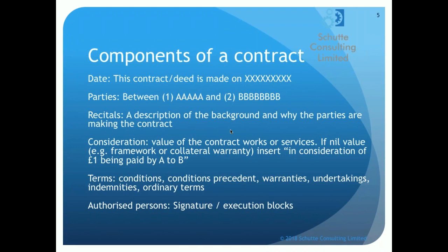money is actually being handed over, in which case you need to use the phrase which is on your screen, in consideration of £1. Sometimes you see £10, but more often these days it's £1, I have to say, being paid by A to B. Okay, so if you have a nil value contract, you must nonetheless have a consideration clause to show that consideration is being given by one party to the other.